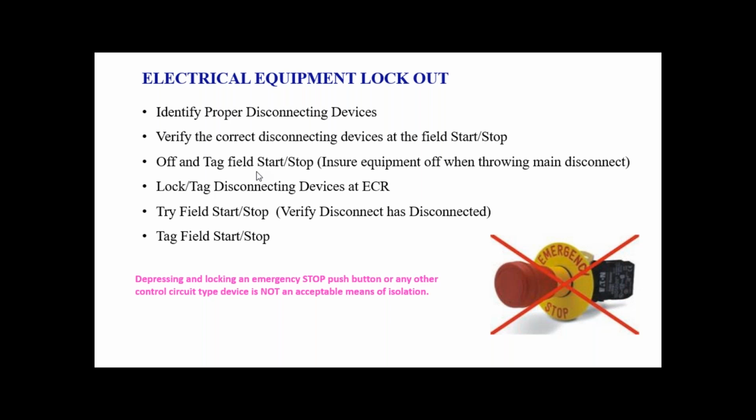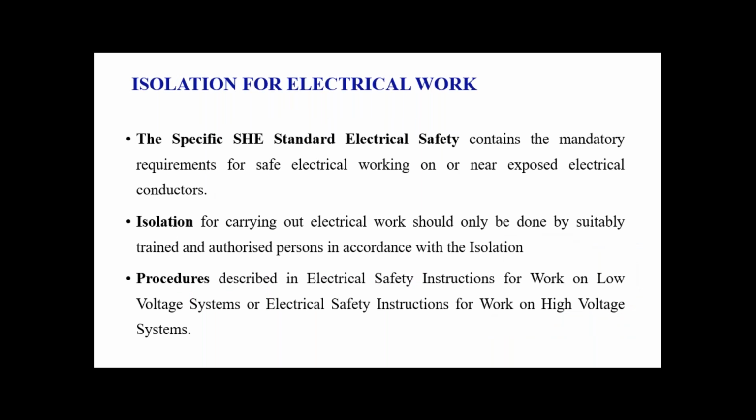Depressing and locking an emergency stop push button or any other control circuit type device is not an acceptable means of isolation. So don't use these emergency stop cases when you have applied these LOTO systems for the electrical equipments. The isolation for this electrical work is the specific SSE standard; electrical safety contains the mandatory requirements for the safe electrical working on or near exposed electrical conductors.